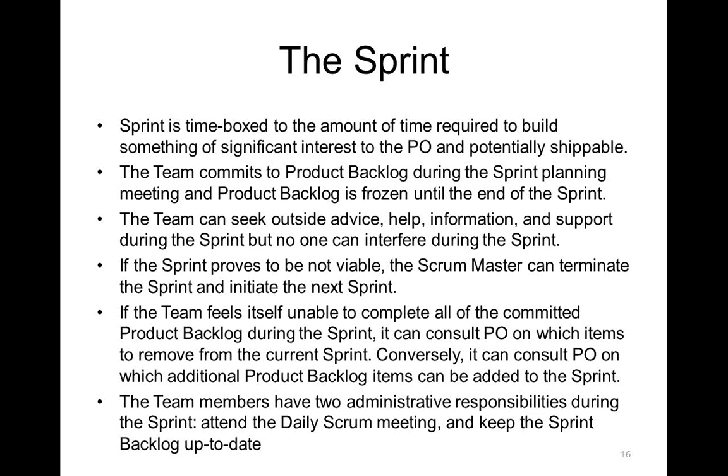In either situation, they have to get back to the product owner and, by consensus, resize the commitment. They can say that out of these 5 stories committed, perhaps only 4 can be delivered, and the 5th story will have to wait for some time for whatever reason.